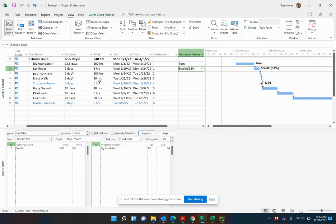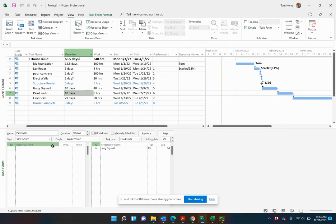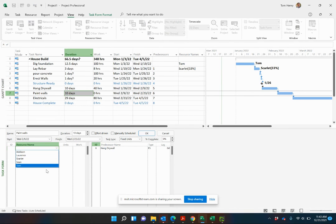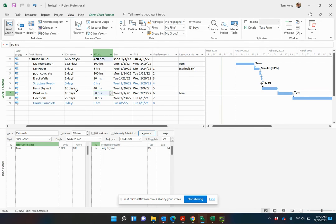Let's take another example of this. So paint the walls. We have not estimated a work effort for this one. So when I assign a resource to this one here, let's put Tom on that one. By default, it's going to be 100% units, full time. 80 hours, full time, 80 hours, two weeks, 40 hours a week.